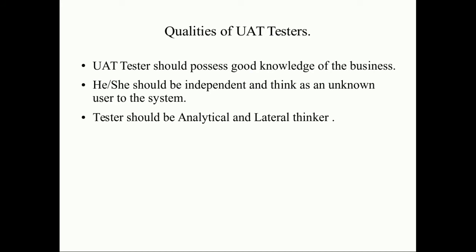Definitely it should work satisfactorily. And the third one, user acceptance testing sign-off meeting with all the stakeholders. It should be completed before moving to production. So these are the things that may be considered as the exit criteria.